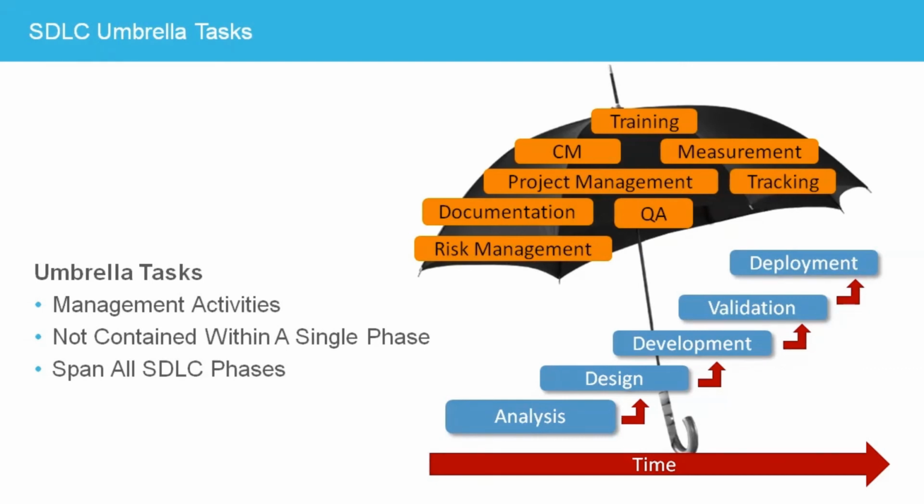Other umbrella tasks include determining how to reuse working software, how to conduct formal reviews and approve project documents, and planning for risks. Throughout the project, performance should be objectively measured, resulting in quantitative data. This data can be compared against established metrics to evaluate the project's status and make course corrections to keep the project on track.